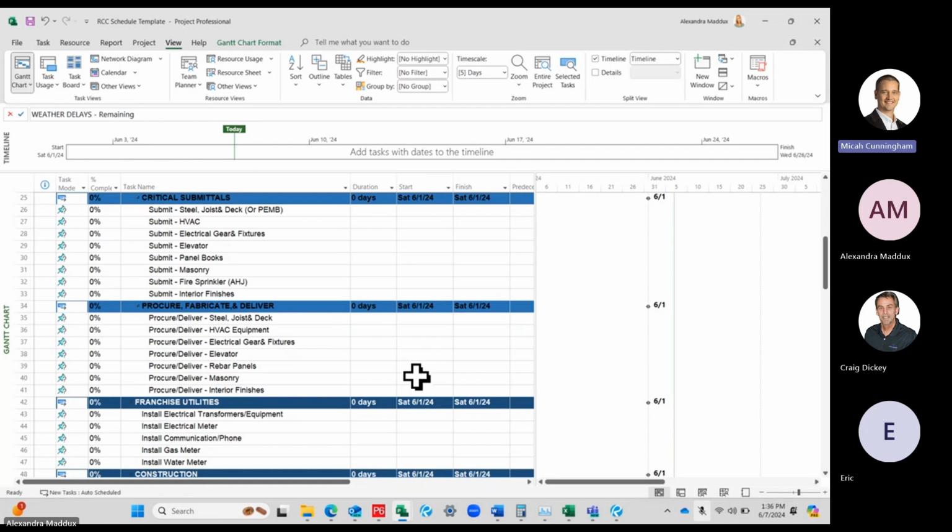Those are basically guidelines that you're supposed to follow for best practices. The scheduling standards that you follow are going to be first based on your contract. If you have a scheduling specs section of your contract, you would reference that. That would be things like determining the longest duration that you can have, or certain milestones that you have to include.